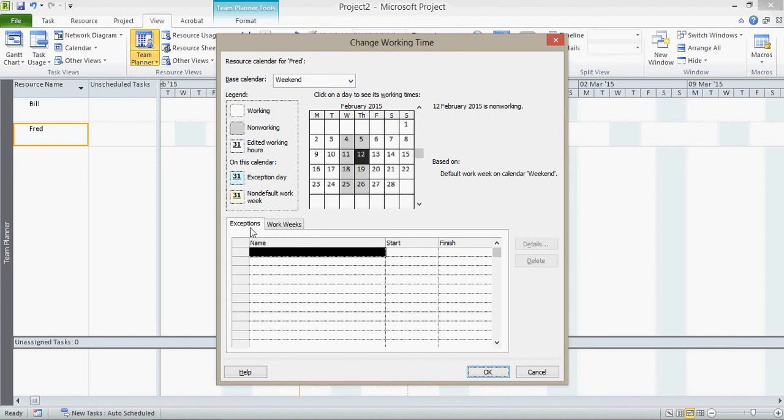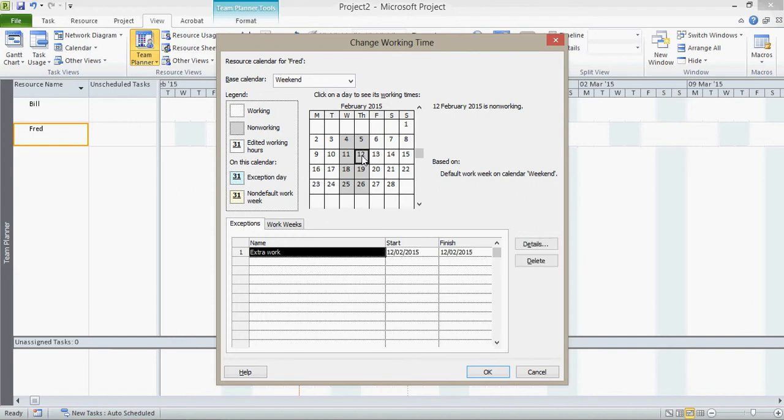What I'm now going to do is create an exception and I'm going to say extra work. And this is going to be on whichever day I have selected here. So if I click a day there, it puts it in as the 12th, which is the Thursday. Now although that's normally, effectively is Sunday, yep, I'm going to make that working. So I've created an exception.